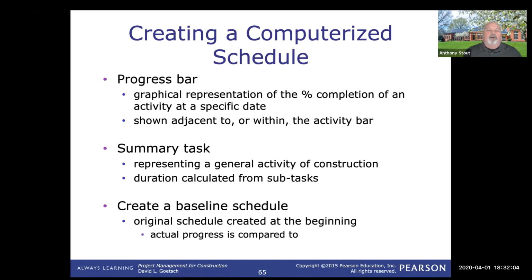We'll talk about progress bars and showing completion. And we'll talk about a baseline and how we define that, which is really where we're measuring from. When we baseline a project, we're saying this is a starting schedule, and this is what we're going to measure success from. So if I had a task that's supposed to start and has a duration of 30 days, that's my baseline.